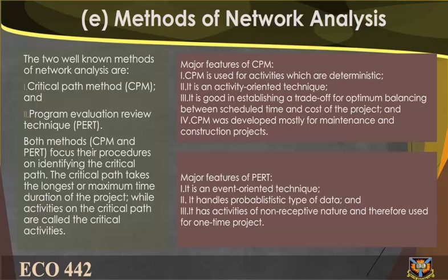Major features of PERT. 1. It is an event-oriented technique. 2. It handles probabilistic type of data. And 3. It has activities of non-repetitive nature and therefore is used for one-time projects.